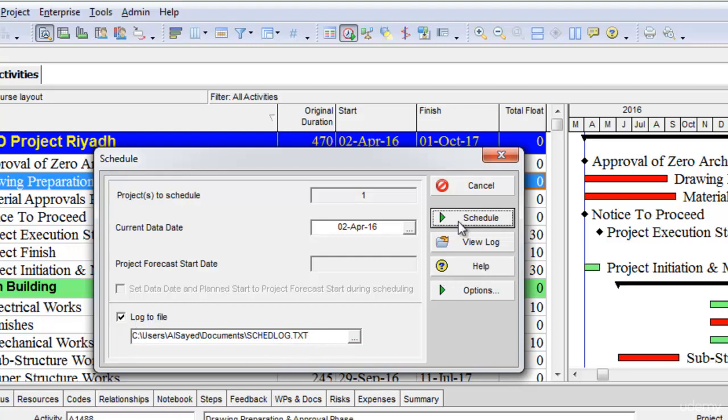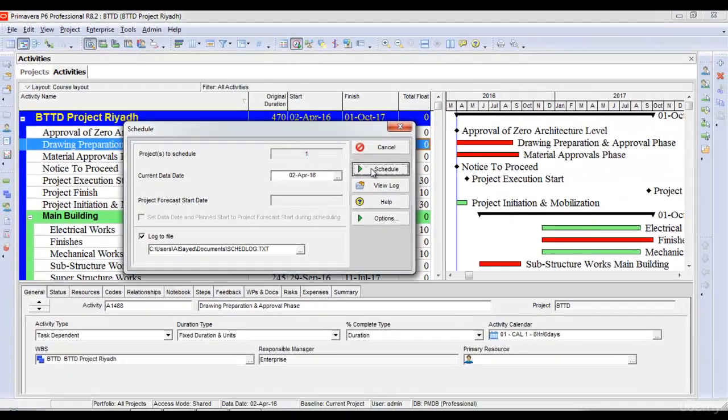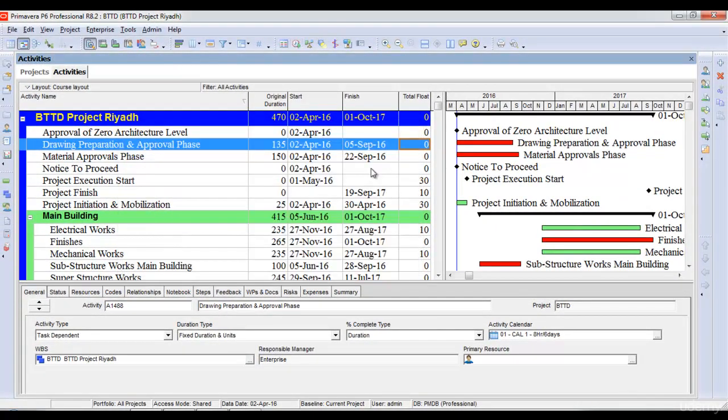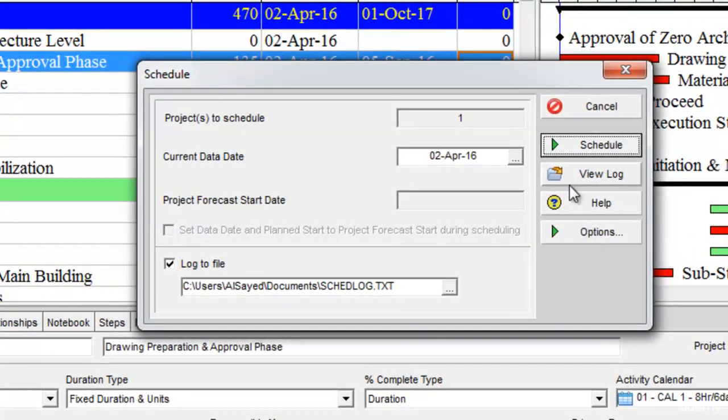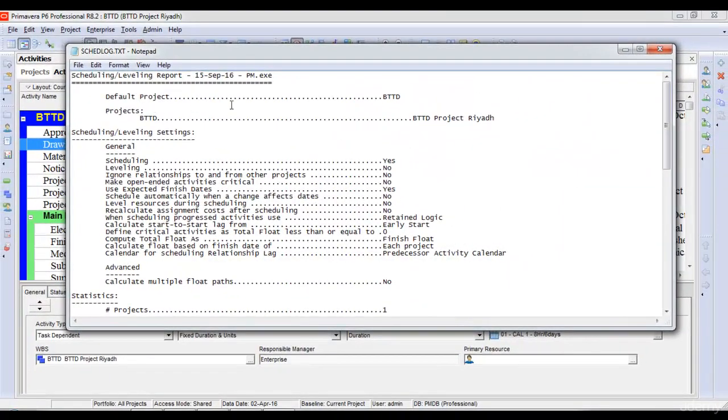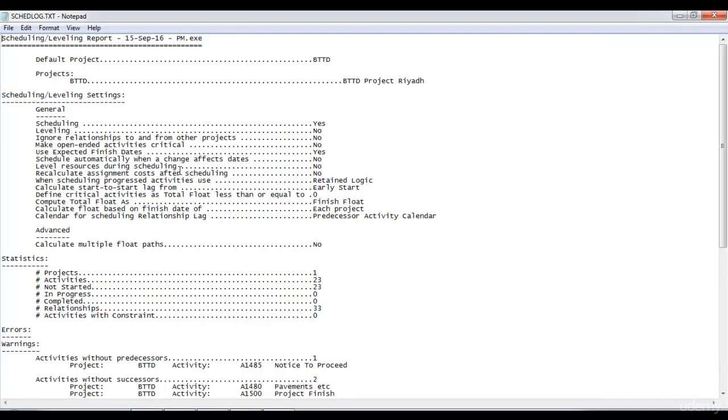Then we will schedule our project which is open, or any schedule for which you want to check its log. Once we have scheduled the project, we will again go to the schedule option and click view log. Here it opens a file in the notepad or text file which gives a lot of information about the project.